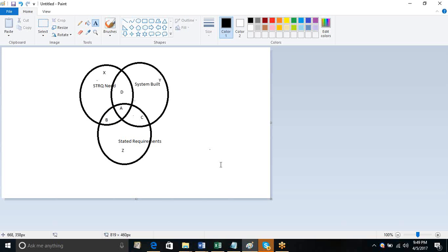If this iteration is coming to an end, then you cannot merge it into the immediate deliverable that you have. But you will look to add it to the upcoming iteration. Okay, that's one way. What's the other way?